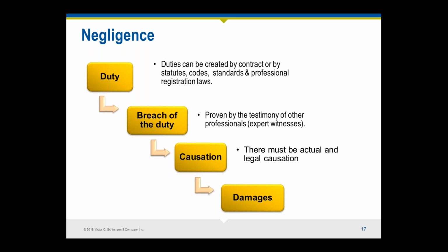So here's an example of a case study that we looked at one time that involved an architect who entered into a contract with a school district that required performance of the highest professional standards. Unforeseen conditions resulted in project delays, a very typical claim. Claims from contractors for delays and extra costs contributed to the $1.8 million claim by the school district against the architect. The contractual obligation to meet the highest standards made it difficult to defend the allegations. The highest standard is perfection, and as a result, the architect ended up having to pay $400,000 to settle the claim despite having no responsibility for the delays. Defense counsel says it's almost impossible to defend against that allegation.